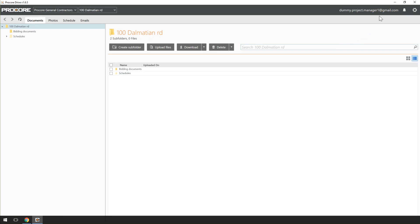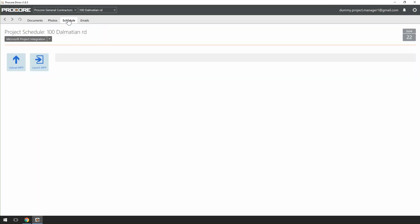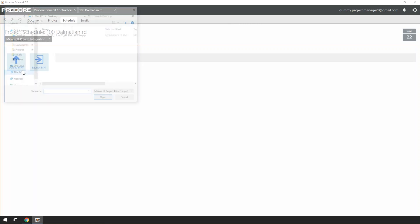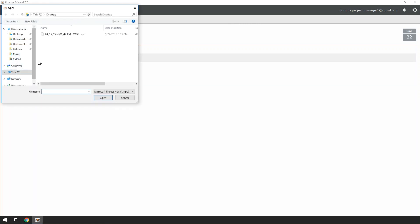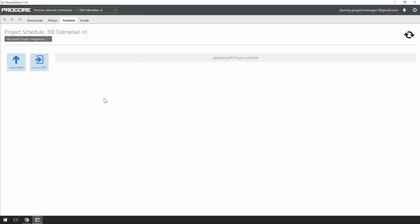Once you're in Procore Drive, navigate to the Schedule tool. From here, we're going to click the Upload MPP and browse our computer for the Schedule file. Once we select it, click Open. Your Schedule will automatically be uploaded to Procore and linked to your Project Schedule tool.